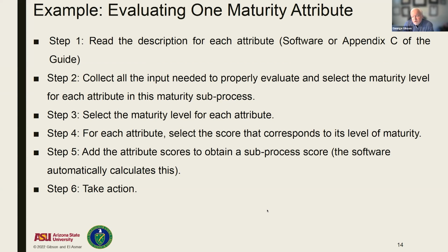In this situation, what we want to have is a facilitator and the team evaluating this and then coming to consensus on where we are for the project or program. So it's a little bit different assessment. And obviously there are more attributes, 56 versus 27 factors, so it takes a little longer to do this one. I think yesterday we talked about this being a three or 4 hour time frame. But the nice part is you really look at the maturity of your system from A to Z. It's pretty much everything as you go forward. So anyway, I just wanted to set that stage for giving you an example.